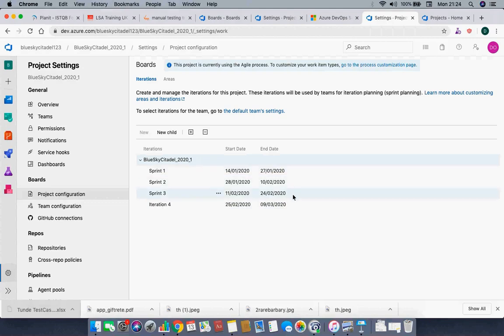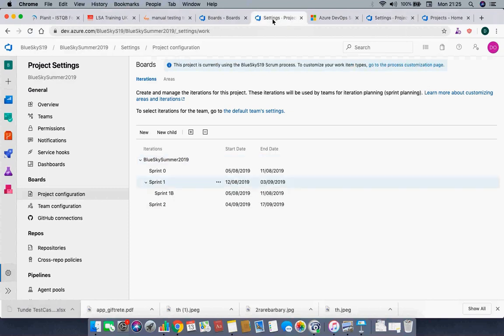Just add all the points together, and then divide by the number of sprints that you've done. So that will give you an idea, so that the next time you don't over budget or under budget the number of points that you can do. So you already have a metric to know, okay, we've not been able to do 20, so why do we have to be putting 20? Maybe 15 is a realistic effort that you can actually put in your sprint. So that's how to correct this particular date.